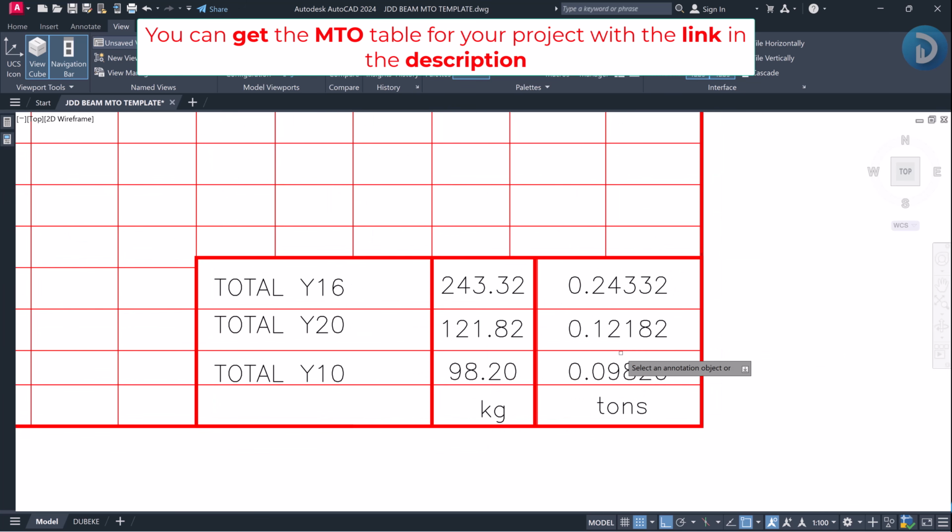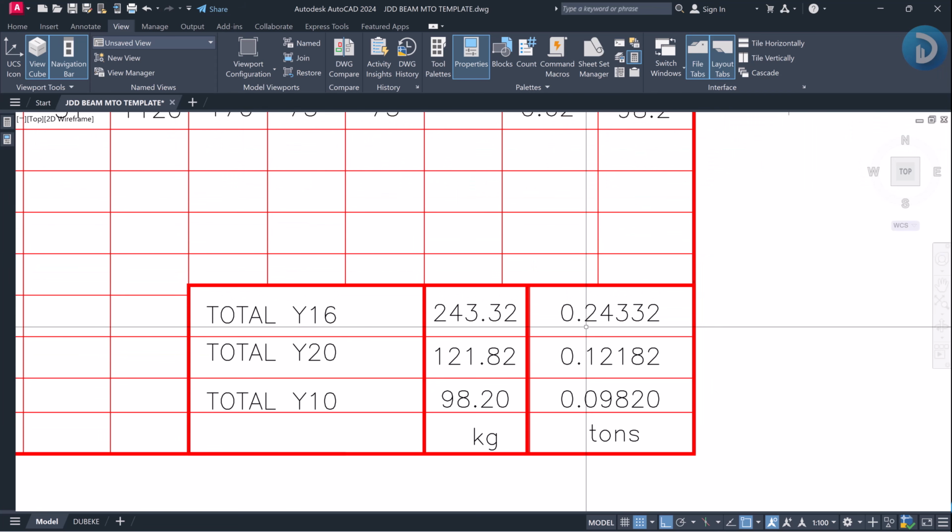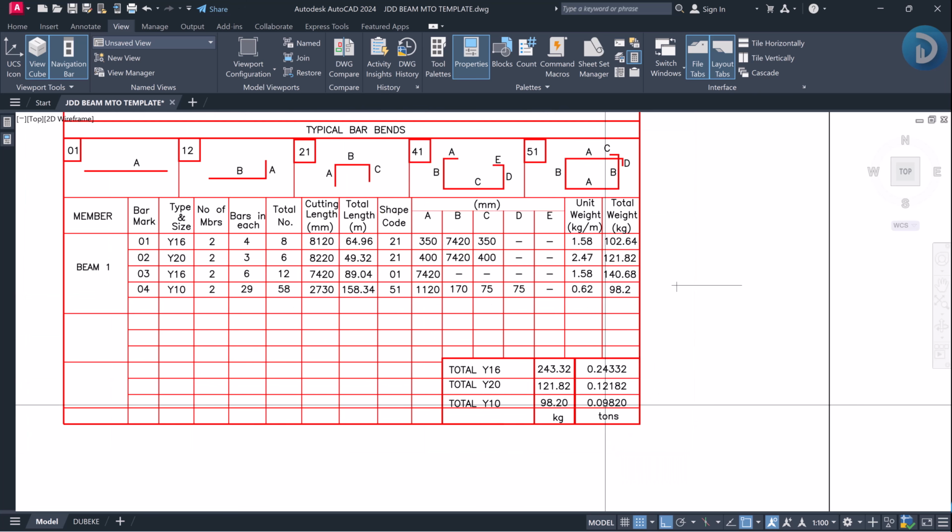So that's to say, we require about 0.2 tons of this reinforcement, right? This about 0.01, this is about 0.1, and this is about 0.09 tons of diameter 16 reinforcement for us to achieve this simple beam one, right?